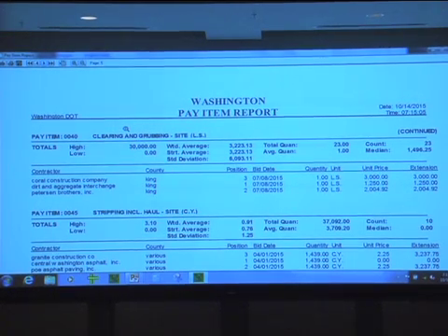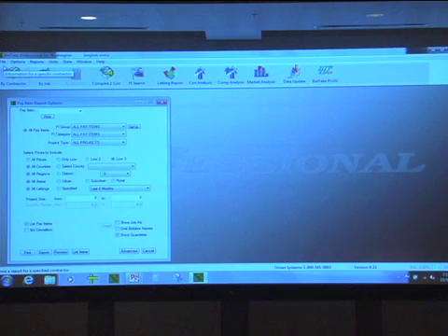This is kind of the same sort of deal you have in a report. What it's showing you here is all the pay items that Washington State has used in their contracts that they let over the last 6 months. It'll show me how many contracts I used it in, give me the quantities and some averages. I can even put contract numbers in here so I could look up those jobs for those items if I wanted to. But I'm really interested in what my HMA hot mix asphalt items have been doing over the past 6 months. Specifically, let's say hot mix class 1/2 inch.